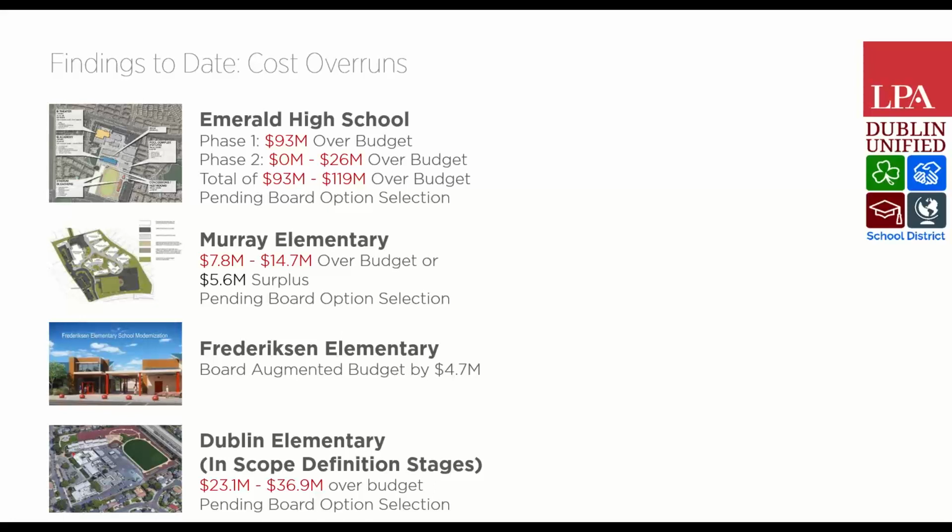You know, you design these projects, you go out to bid. Lately, we've had projects that were substantially, the bids were substantially higher than what our estimates were. So we've gone back to the drawing board to try to resolve some of these estimates. Right now, these numbers are fairly accurate. We've been going over them quite thoroughly, sometimes with more than one estimating company, taking a look at the same project, and then we reconcile those estimates. So the projects you see right here are pretty accurate.